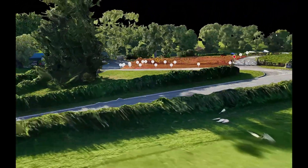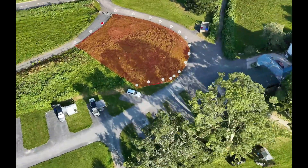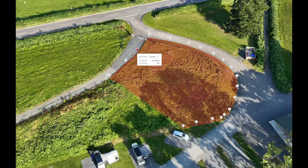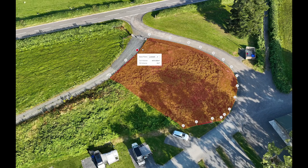With DJI Terra, you can pick specific areas within our 3D model and calculate the precise volume of earth that needs to be removed or added. This lets you accurately factor in costs for excavation, hauling and disposal, giving your clients a really clear and trustworthy quote.